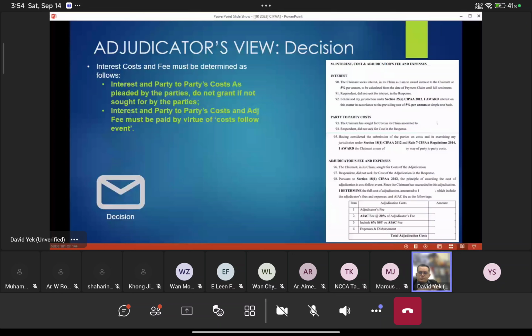That's why there's a safer way. Usually what they do is ask for interest, but allow the adjudicator to decide how much interest. Then, on the safe side, the adjudicator will decide based on the court ruling. So the court says 5%, 5%. That's how it works out. But when it is going to be paid, that is something that can be adjusted.